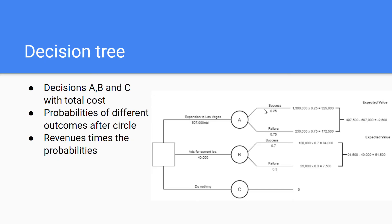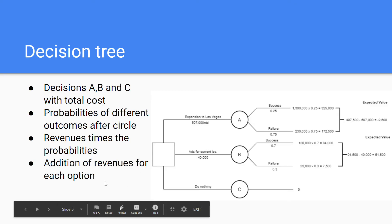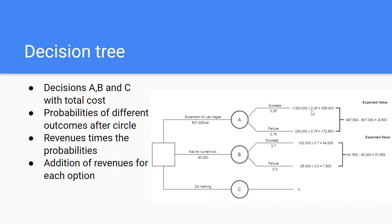Then right after this success outcome and the probability of success, you'll see the revenue. In this case it'd be 1.3 million NTD, which is the Taiwanese dollar. Like I told you before in the last slides, we'll add all the revenues after multiplying the revenues with the probability. We'll add the revenues together to give you this sum.